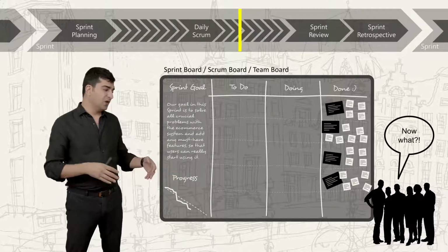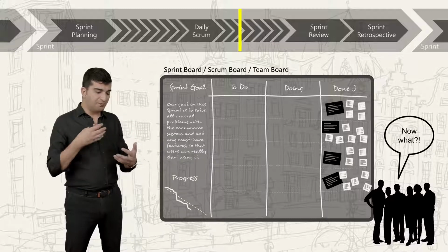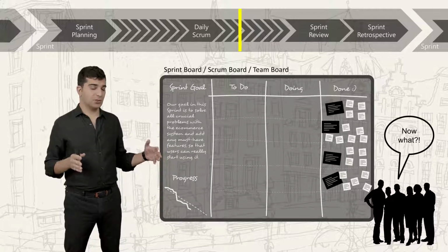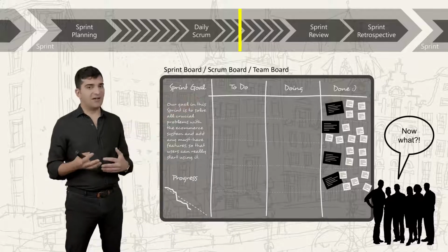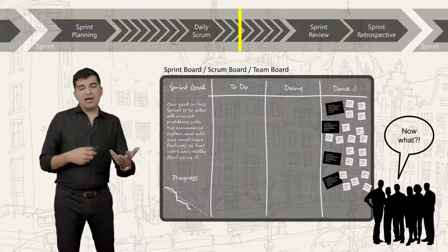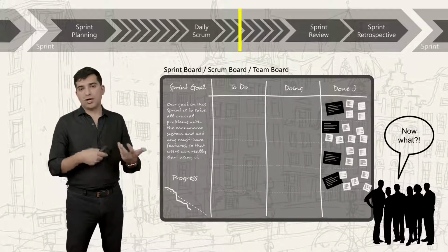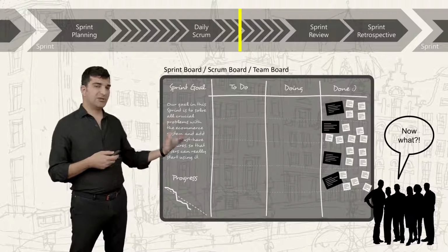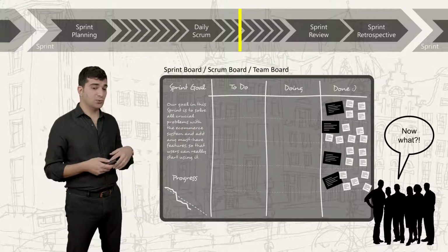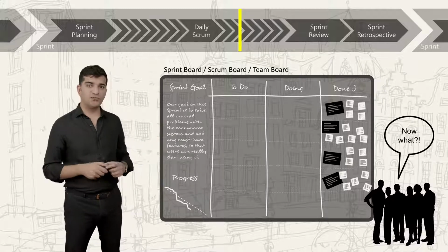That's fine. But for the sprints, to make sure that everything is in order, we will have fixed duration time boxes. So when you're done with everything, you don't have the option to stop the sprint and start the next one. You have two options here. One of them is to spend your time doing other things. Maybe you want to research something that may be useful for the future sprints. Maybe you want to go through the code that you've already written and is working and improve that code.